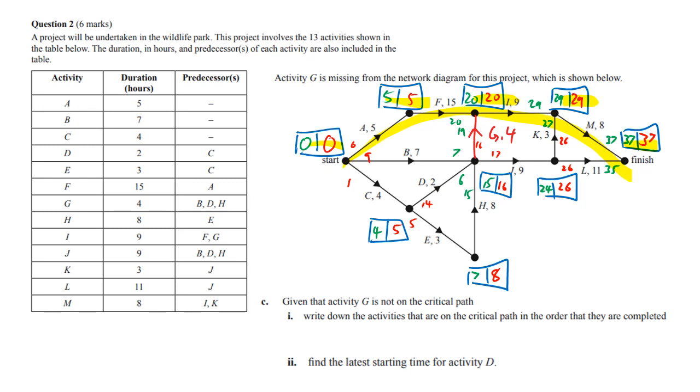But if we're trying to find the LST for D, we might be tempted to use this 5, but that's not true. That's actually also for E as well as for D, and that's where we come into our problems, because what you actually see is on that little red number here, 14, that's the one that's on D. And the answer is actually, by the way, 14 hours.